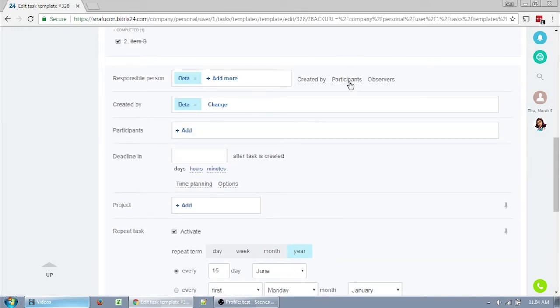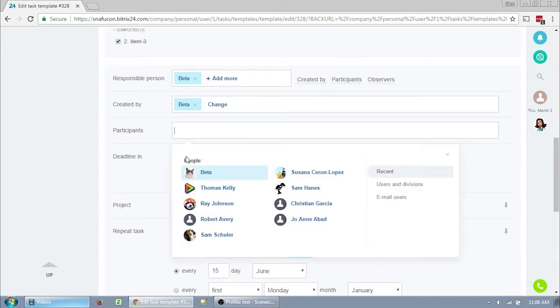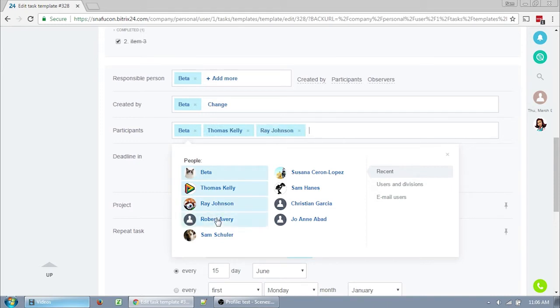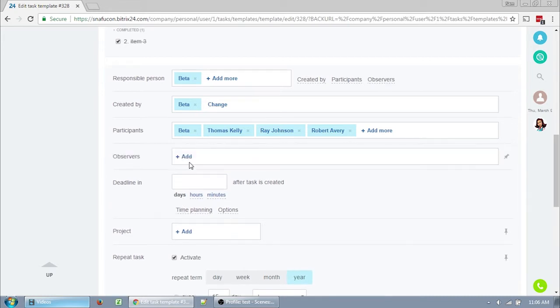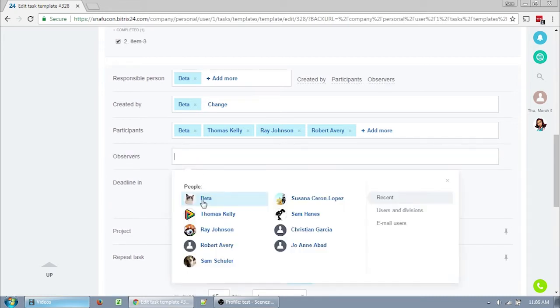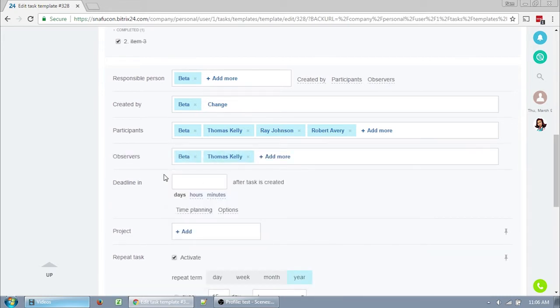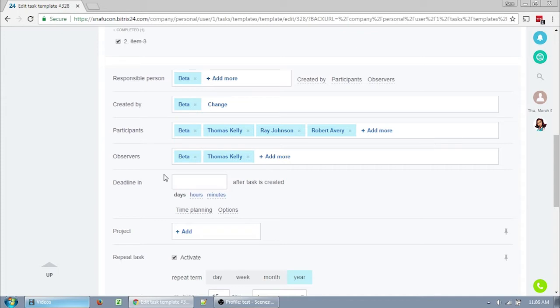Participants are people who can also work on this task. They can mark it complete, they can discuss it in the task's comments, and they receive updates on the changes and progress of the task. You generally want to put anyone who has anything to do with completing this task in the participants list. Observers are people who generally aren't going to be doing things on the task, but should be able to access and see the task's progress. They also can comment and discuss the task. If you're setting up a task for a subordinate that you won't actually be doing anything for, then you probably want yourself and your co-head set as observers.